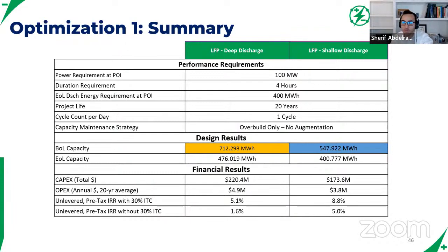Some of them have their standard, off the shelf, 1 cycle a day. In that case, they're assuming the worst case scenario. But in a lot of cases, they will say, give me a usage profile and I'll tell you exactly how much battery you need to purchase from me for this project to last 10, 15, or 20 years based on what you want. So I think that sophistication needs to expand in the industry. And I think it's going to come from developers competing and wanting to put together more cost-effective, reliable, and minimal risk projects. So yeah, agree.